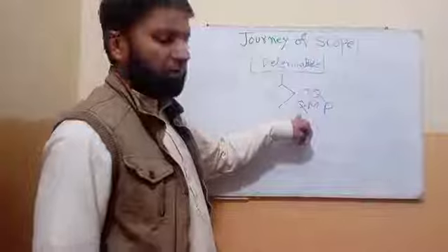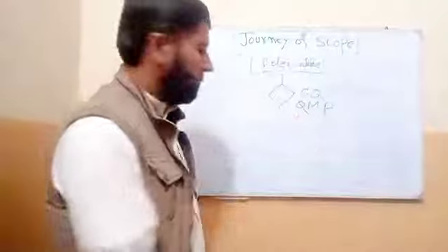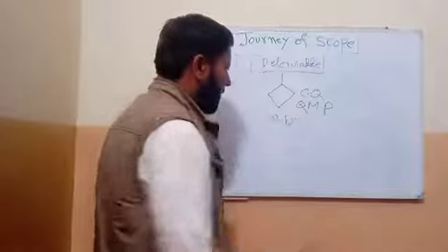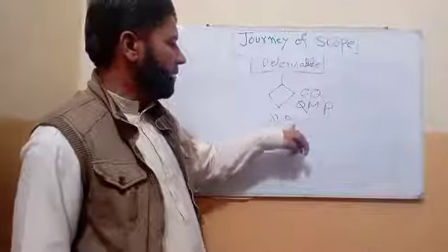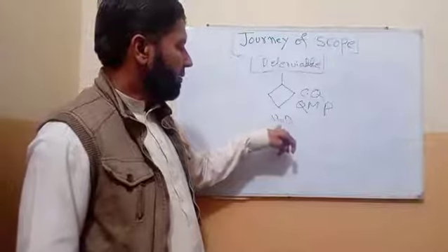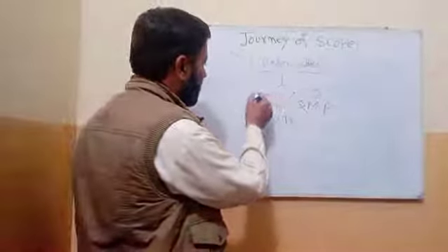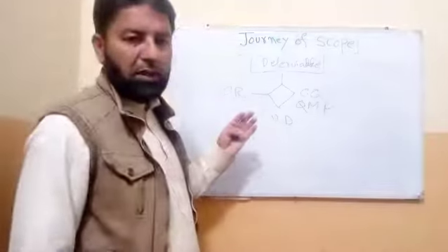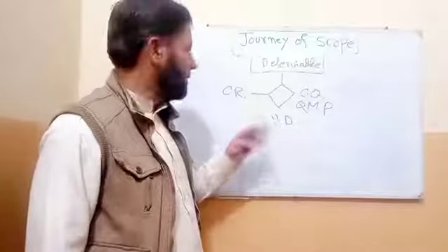If they say it is okay, we get a verified deliverable. If the quality team rejects it, then we raise a change request, and there is preventive action, corrective action, defect repair.